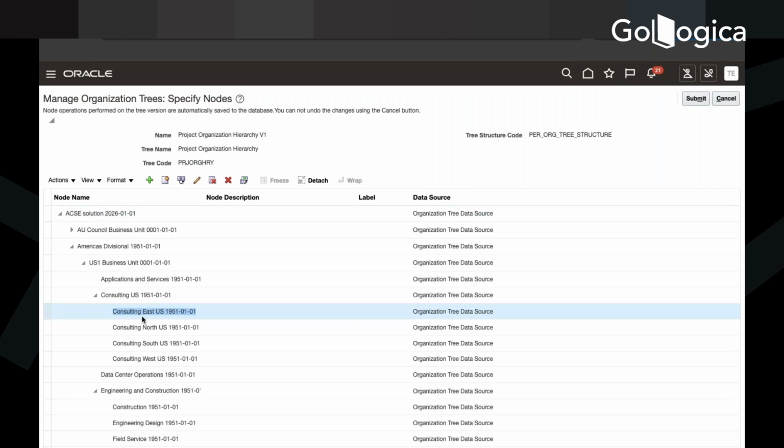So for whichever project is under the same department, if different cost is created against that project, the burdening will be created at that particular cost level, the individual cost level. Project is there, but the burdening calculation will happen on top of the cost, not on the project. Project is at the top level. We are creating different cost against that project.